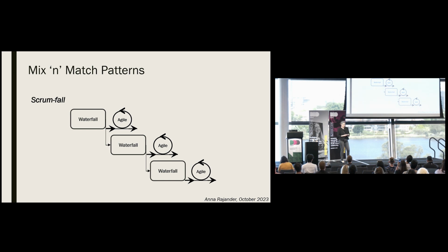Perhaps your initiative will follow more of a scrumfall approach, where agile activity is preceded by waterfall processes. Variations on this approach are commonly used in consultancy settings, where requirements are gathered in a more systematic way, but solutioning is more agile. I had someone once describe to me an approach for procuring agile software development services that followed this sort of approach, where there was a master contract in place, but a separate statement of work was created for each sprint. The process to agree the high-level outcomes and develop the associated statement of work was quite prescriptive, while the actual agile delivery of the solution was agile.